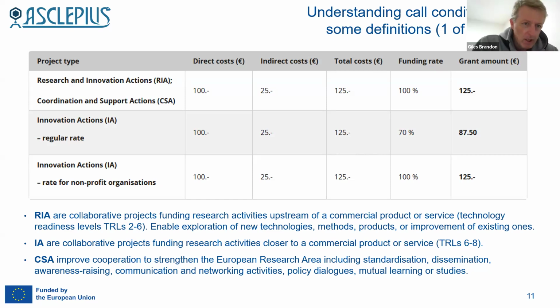So if you're doing a research innovation action or coordination support action, any type of costs directly related to that action are direct costs. So the salary costs for staff working on the project, the travel costs for the involved scientists to go to consortium meetings, the research consumable costs, perhaps for providing phages or chemicals or whatever.